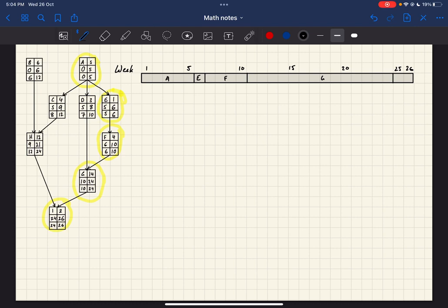And then we've got task I, end of week 24 to end of week 26. Since a supervisor can only supervise one task at a time, we need to have a full-time person watching all of these tasks, so that for the duration of that project, you have a supervisor just watching the critical path. So that's supervisor 1.